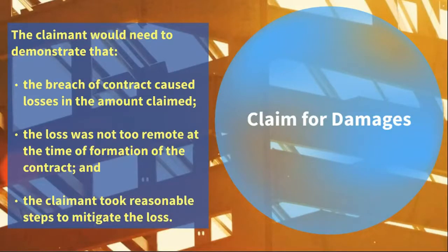A party claiming damages on breach of contract ought to have performed or was ready to perform the required part of the contract. Hence, the duty to mitigate losses is indispensable before claiming damages. So the claimant must be able to establish reasonable steps taken to mitigate the loss.